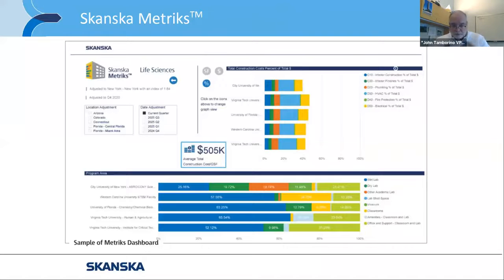As many of you may be aware, there's been a big increase in costs for materials across the US. It's outrageous, really. So in our quarterly report, we see that the overall construction index is up by 1.1% over the last quarter. When I look at the costs for, say, steel over the last quarter, the costs are up 19% over last quarter versus today. This is only a first quarter report.